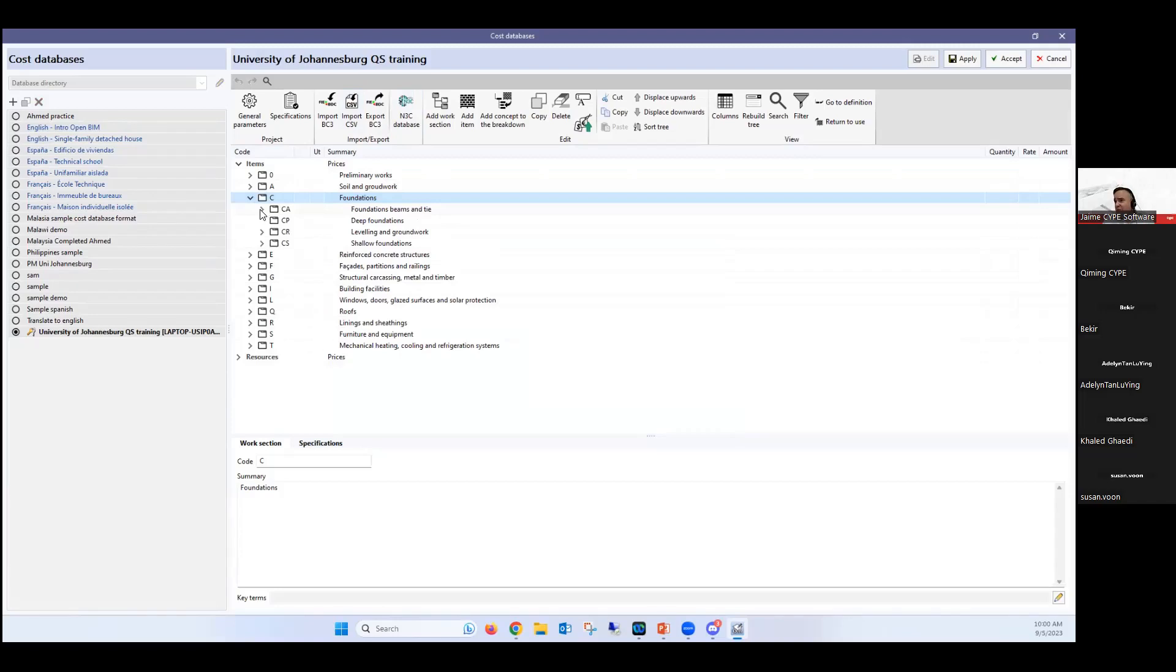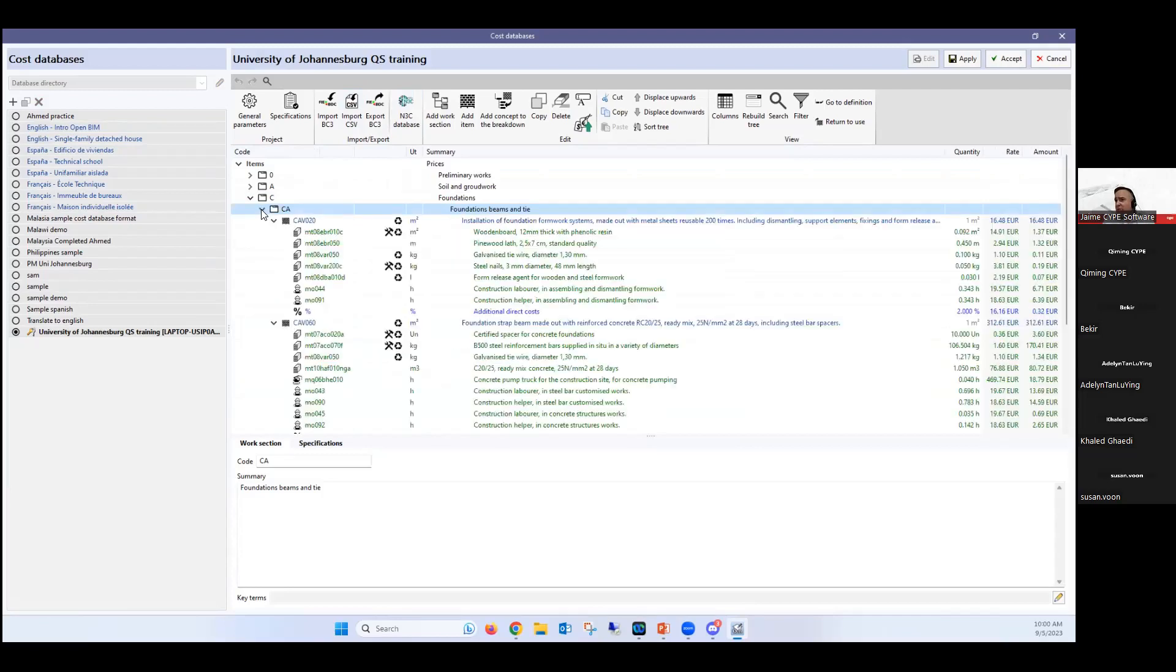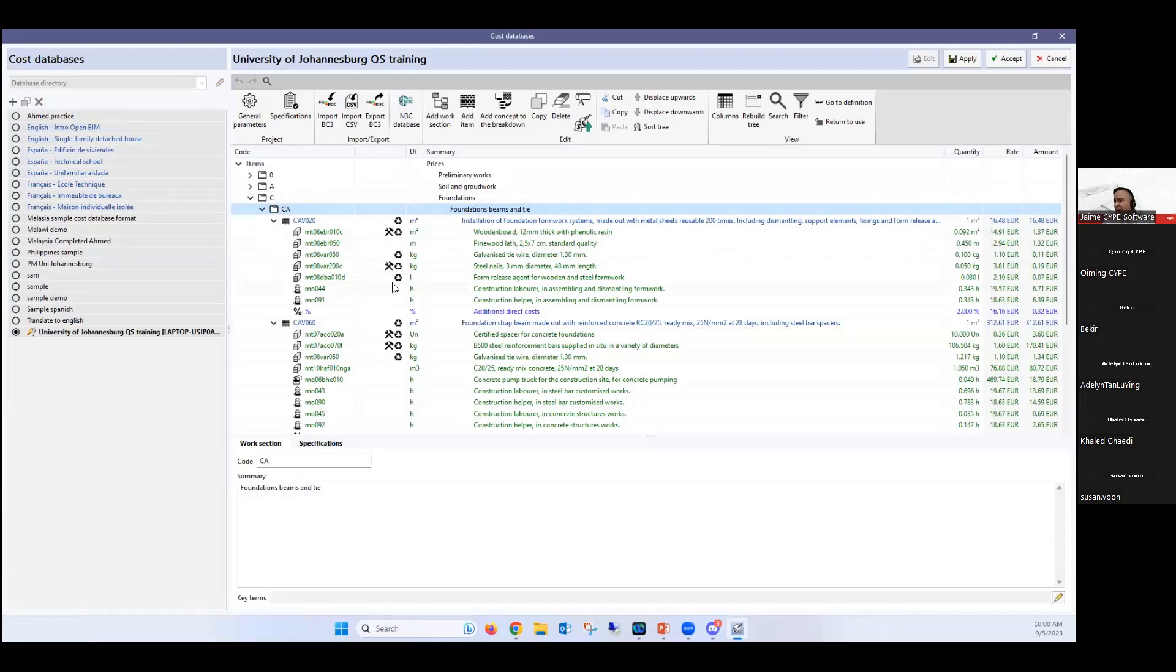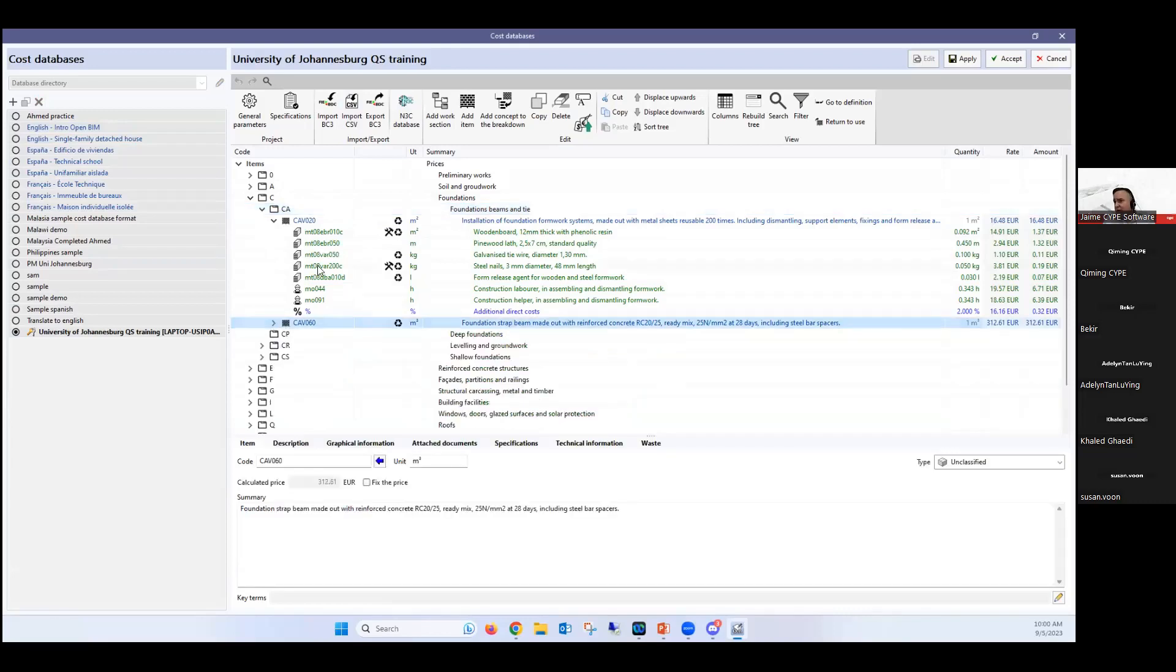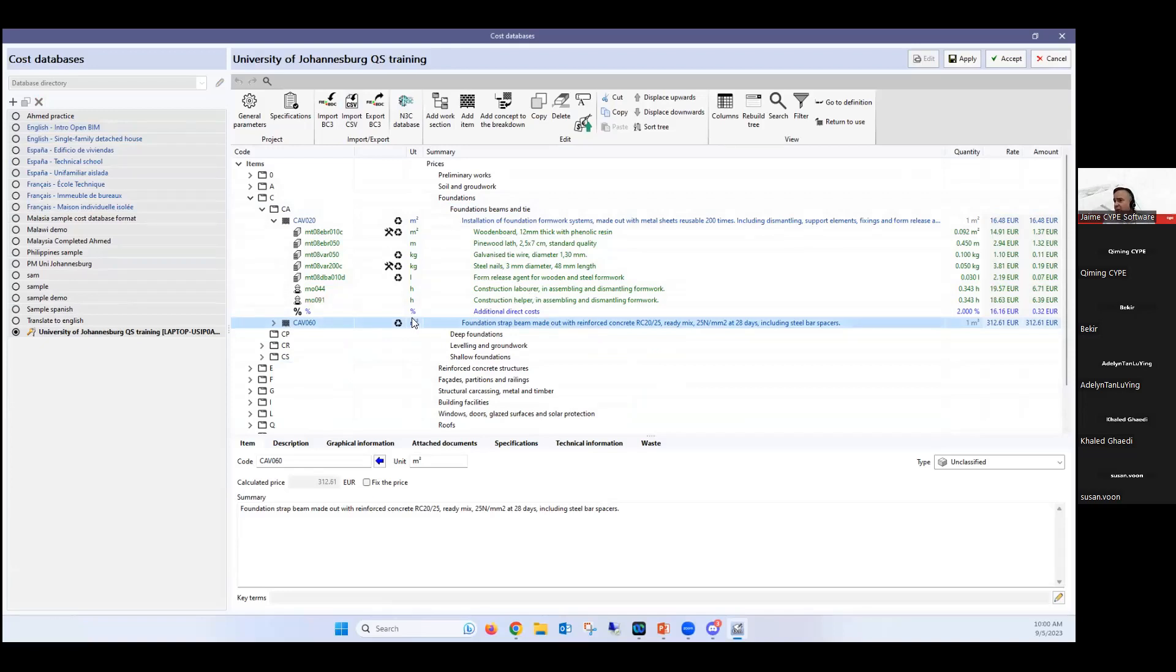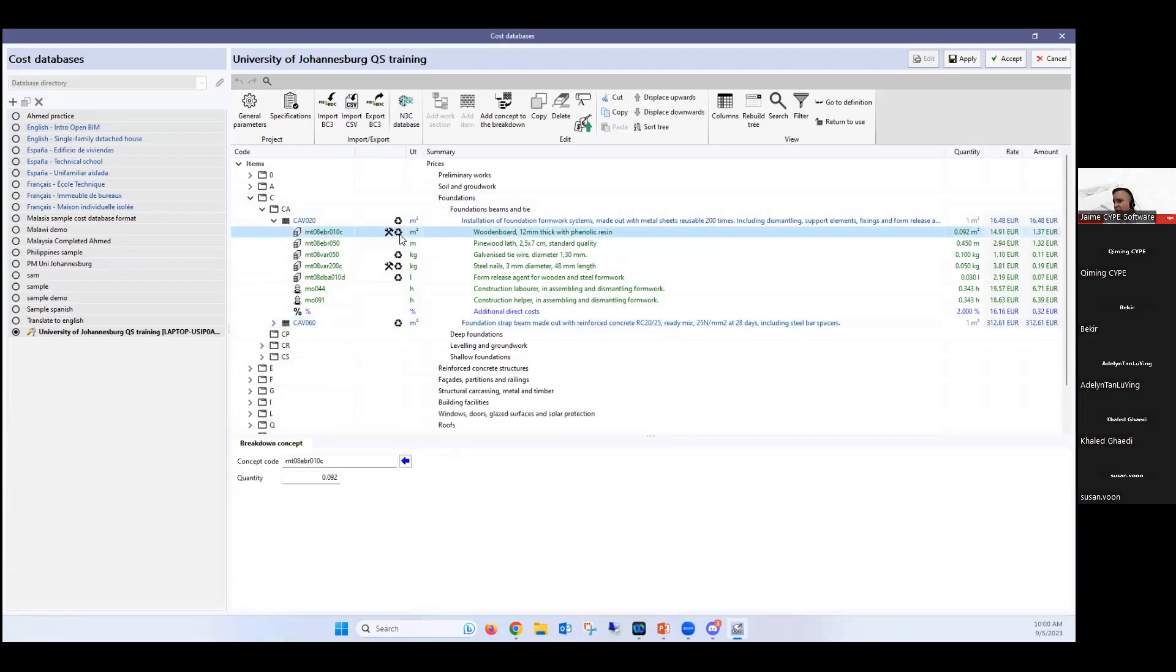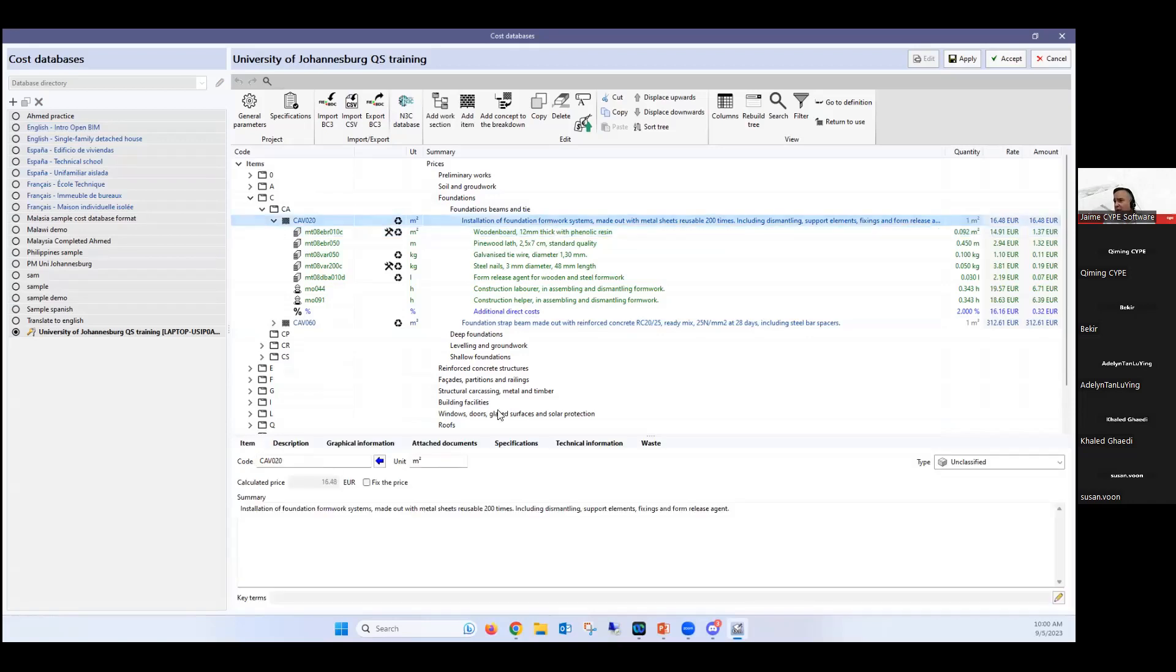And now our cost database pretty much here, you can see when it comes to foundations, we take a look at the foundation and you will see that it has different foundation elements. For example, it has beams and ties, and then it has a different breakdown for each of them. The possibility of the breakdown, it's pretty much up to you. Like for example, this is one square meter of this particular installation of foundation formwork is consistent of a piece of wood, the pine wood, the galvanized steel tie, materials, all the materials that it includes, and then all the labors and also indirect costs.